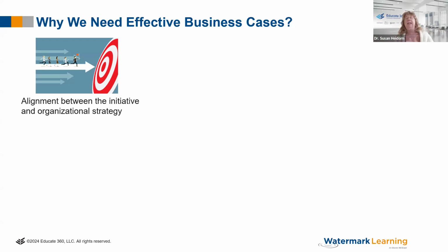Now, most of the companies that I worked with have a threshold on business cases. Sometimes it depends on how large the company was. Sometimes it was like, okay, 500,000 or $1 million, we'll do a business case. For smaller companies, the threshold might be 100,000. Anything above that, a business case; sometimes 50,000, you do a business case. Otherwise, if it's just a fix-it thing, probably not. You still need to prioritize it, but you may not need a full business case.